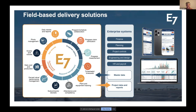E7 is intended to be a system used on a daily basis, with four core capabilities. First is site records: photo management, supervisor diaries, unplanned events, and notices. Second is schedule collaboration — we hold the P6 schedule or any other scheduling tool for daily progress measurement and progress claim verification. Third is resource management: time cards, plant and equipment usage, attendance, subcontractor costs and labor. Fourth is insight — combining site records, progress, and daily costs to provide earned value and production rates.